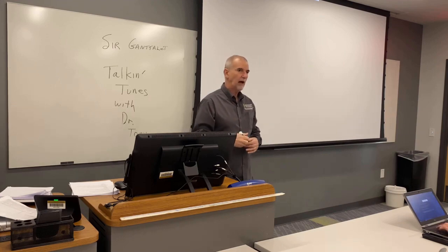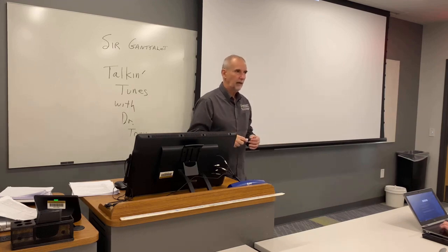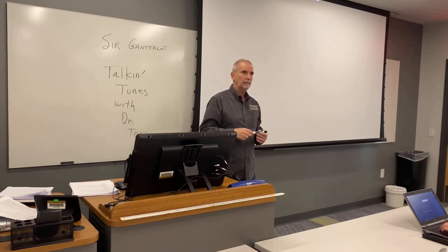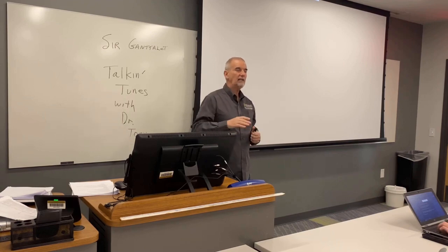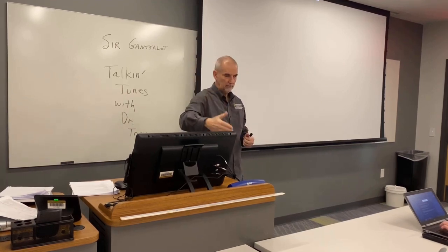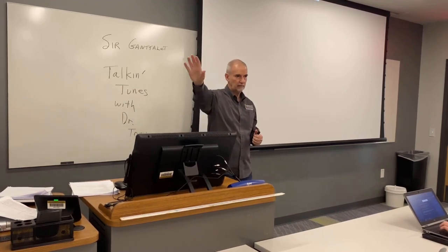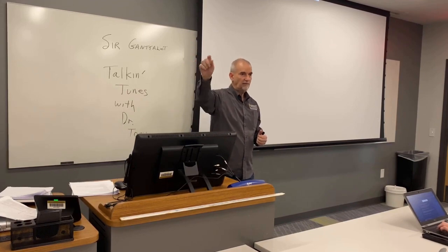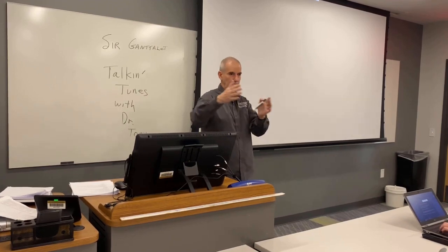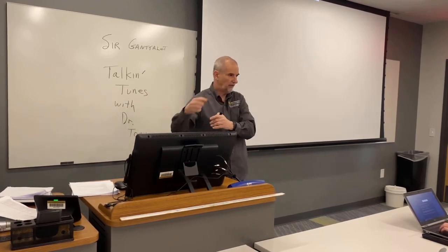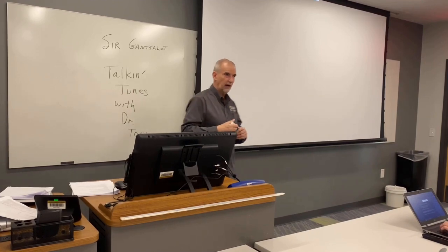If I'm remodeling a house and I want to paint a wall, I need to finish sanding the wall before I can paint it, right? If I start painting before the sanding's done, it's going to be a mess. So I finish sanding and then I start painting. Finish to start. You got it?